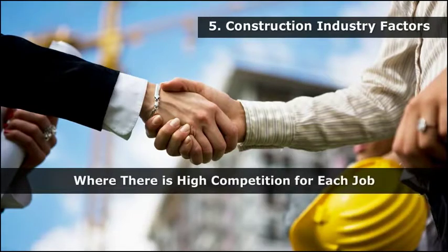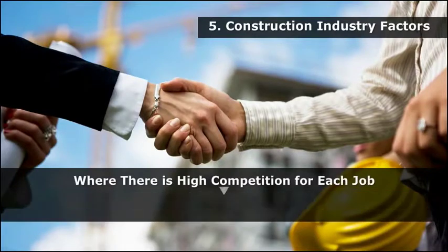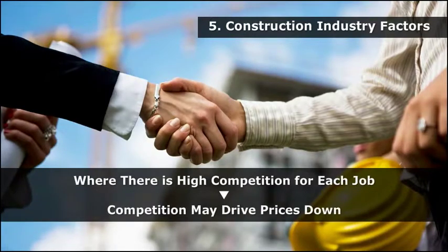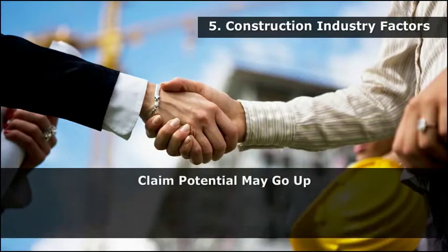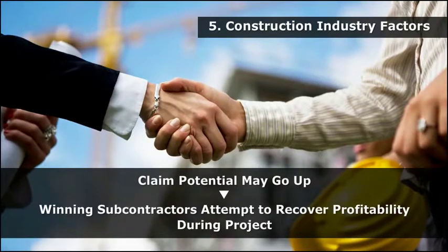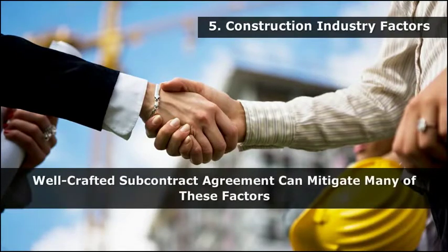In situations where the competition for each job is high, competition may drive the prices down, and in such cases, claim potential may go up as winning subcontractors attempt to recover profitability during the project itself. A well-crafted subcontract agreement can effectively mitigate many of these factors.